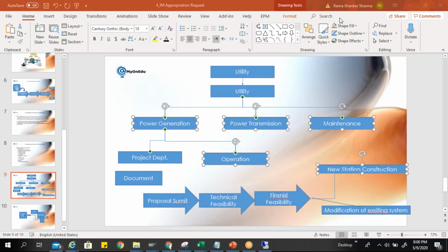First is, let's say, server installation. That is one idea, one project. Second, licensing and all, because it's a separate thing and my separate team will be involved there. And third is the ERP implementation, the SAP implementation. So three different projects are involved for the same idea. Similarly, we can assign multiple projects to my one appropriation request.